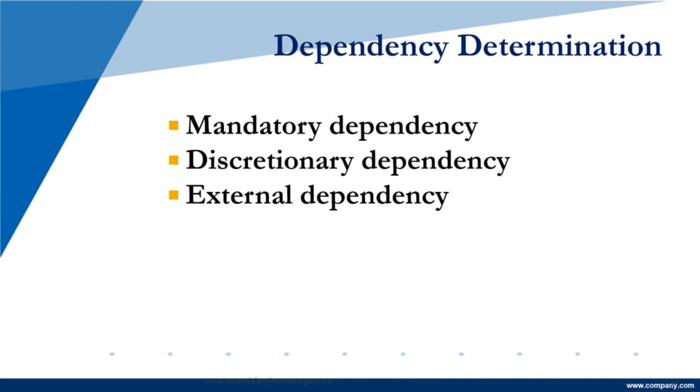Now, you can have external dependencies. Again, something from the outside. You may be told you will not start this house before this date. Now, why would that happen? Why would someone who's building houses say, you cannot start a house before the first of the year? Well, they may not want to spend money until a certain date. Remember, real things happening in real time. So maybe there are other factors that you don't know coming from the outside in.